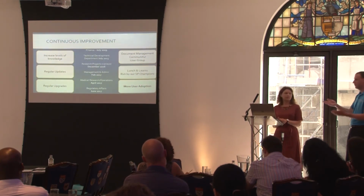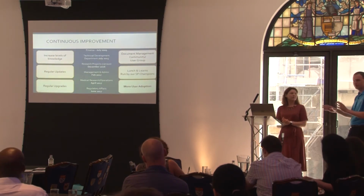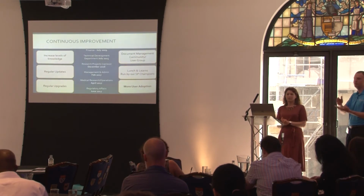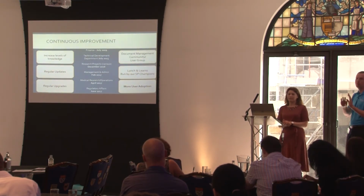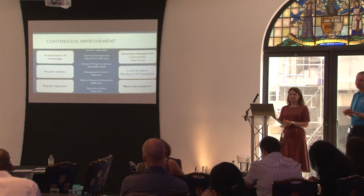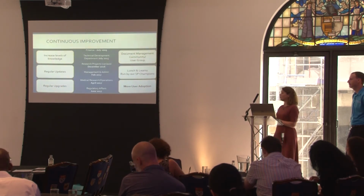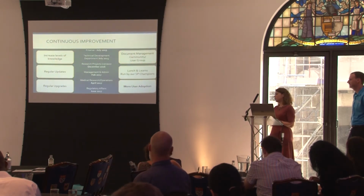That's right, and that's one of the things. At the start of every training course we did for these champions, we did loads of courses for those, at the start of that course, every time was what you should put in here and what you should not, because that was a key lessons learned. So at the start of every session, that was before we even logged in, that was the key message right at the beginning. You didn't have any GxP data? Not in SharePoint. Well, we did have in SharePoint 2003, which we shouldn't have done, but not in the newer versions.